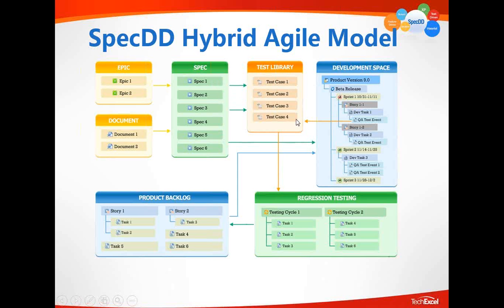If the same spec 1 needs to be assigned to a different team member as an implementation assignment for a different module or a different platform, story 1 represents the implementation for iPhone, and the second copy of the story for spec 1 represents the implementation effort for Android tablet. It's two assignments of the requirement commitment.